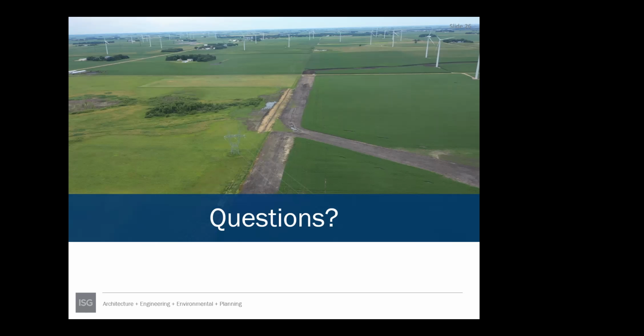Pick on some projects we've been doing in Jackson County. There's a lot of rural water lines, and those rural water lines were put in underneath the existing tile, but come in conflict many times if you're going to do an improvement by deepening it a foot or two. And working ahead with those companies, they've come out and actually lowered the lines ahead of us. So as much coordination as you can do at the front end, I think can save dollars on the back end. You're always going to have some surprises, but that's something that I think we all know, but it's just good to reiterate that.